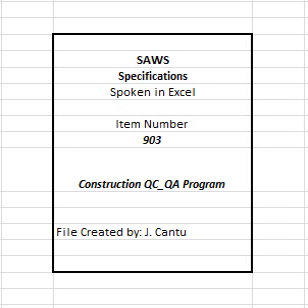B. The primary responsibility for overall management and control of submittals lies with the contractor. C. All required submittals shall be provided in a timely manner, and according to contract documents, to allow for the review, approval, procurement, delivery, and QC preparatory phase of an item before it is needed for construction.